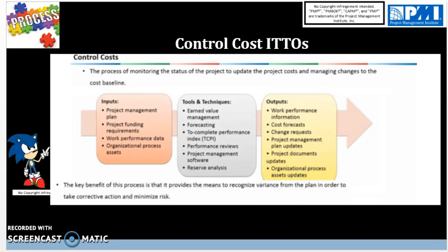For the performance review, we also include a variance report, which is actual result versus the baseline to see the variance, how much of a negative or ahead positive value you are. Trend analysis report shows how the progress has been made over time and helps understand the trend of how much the cost has been spent.